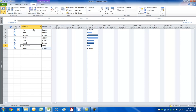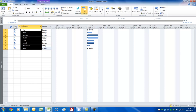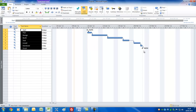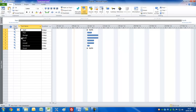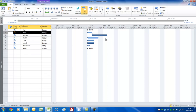Now we could just link these all together by selecting them all, going to the Task menu, and just choosing the link tool here — and they'll dutifully do as you say. Let's unlink them and I'll show you something else. What you could do is actually overlay the mouse on the bar itself so you get a four-pointed cross, click and hold, and drag downwards — and that would link them together.